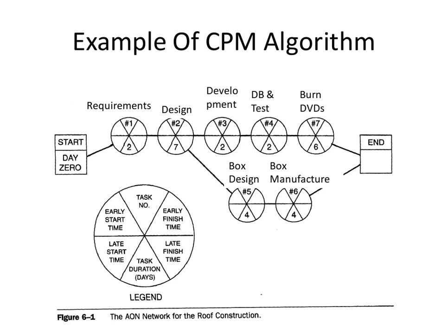Early start on the upper left, early finish on the upper right, late start on the lower left, late finish on the lower right. Okay, so without loss of generality, we'll call the earliest start of this first task day 0, okay? What's the earliest it could finish? 2, time 2. It takes 2 time, and there's no way it could finish before that time. Okay, what's the earliest this next task could start? 2. Yeah. Why is that?